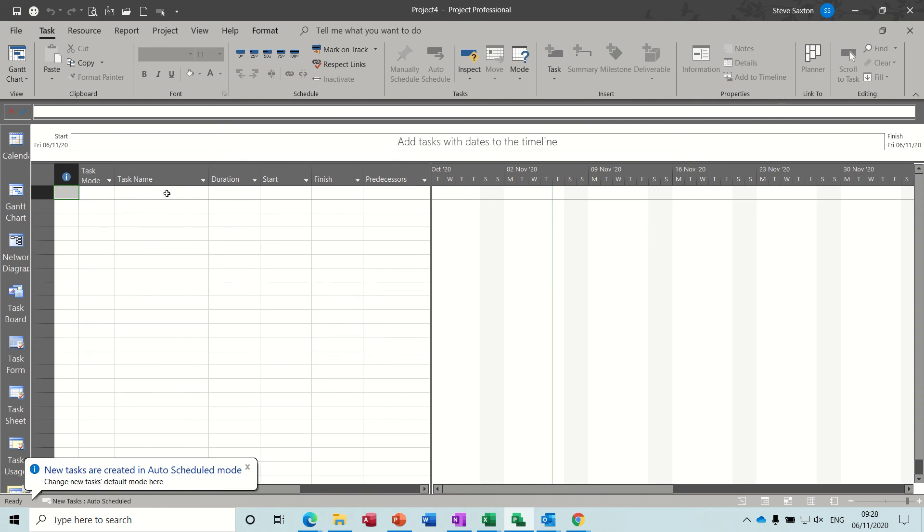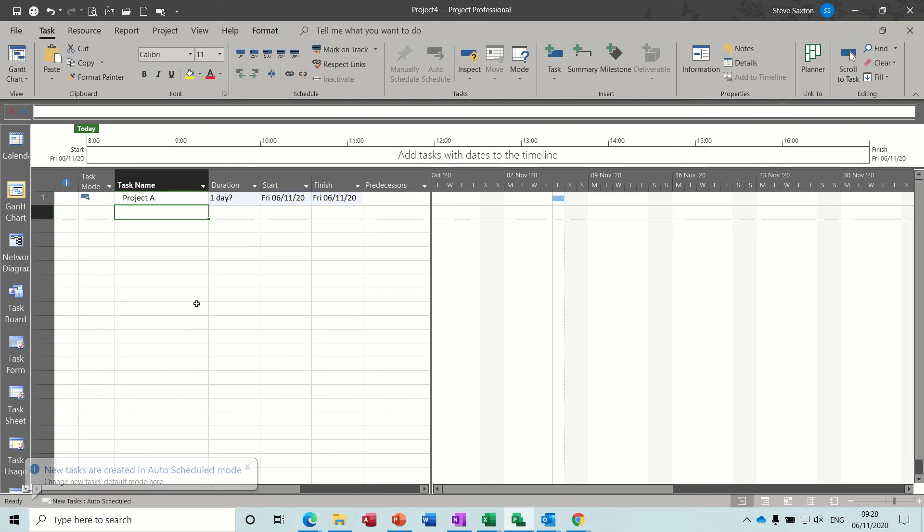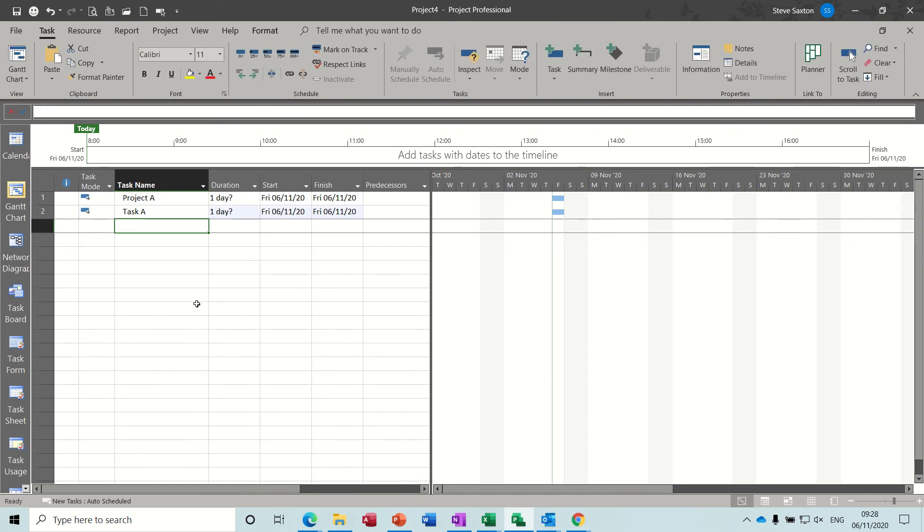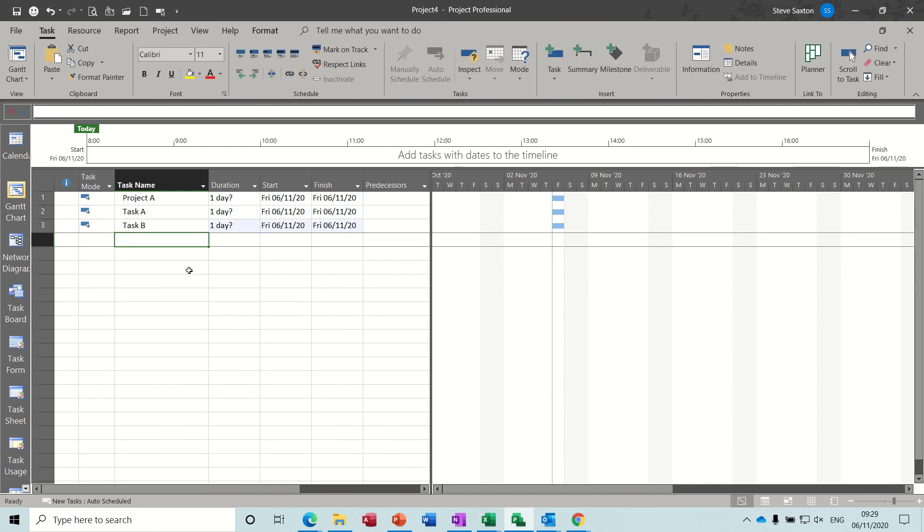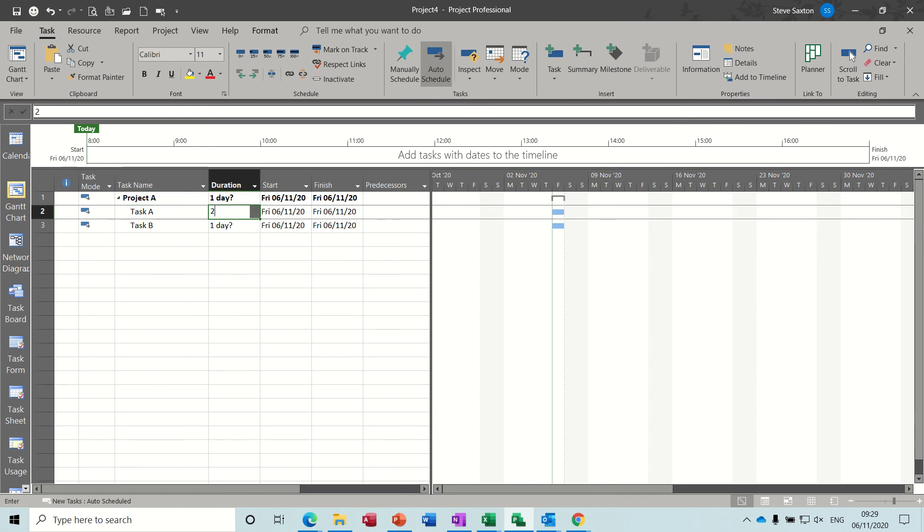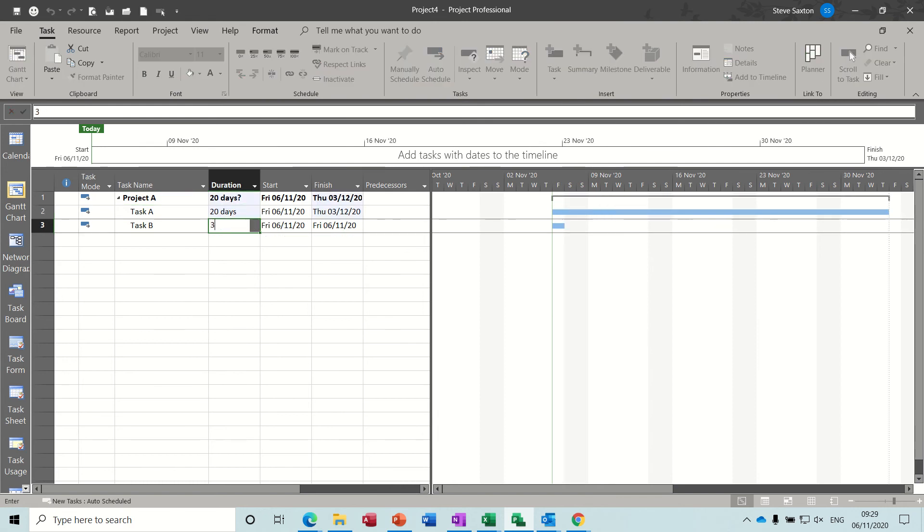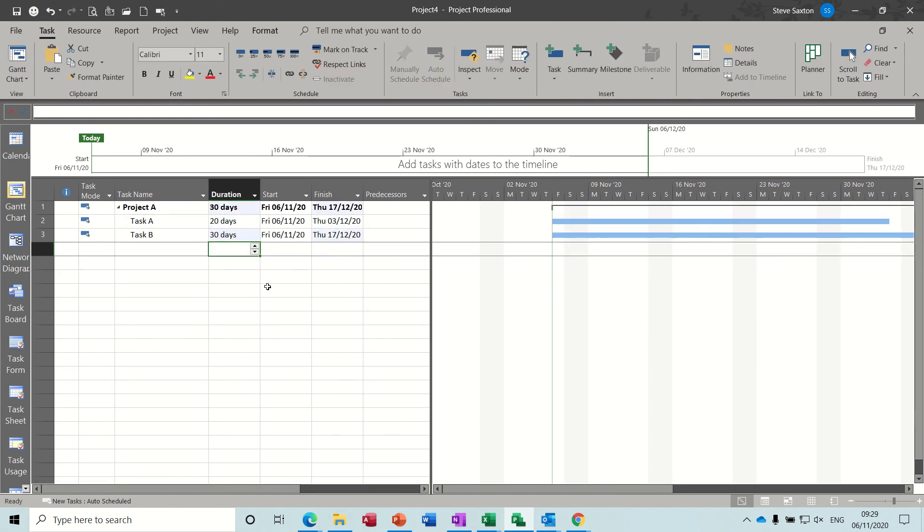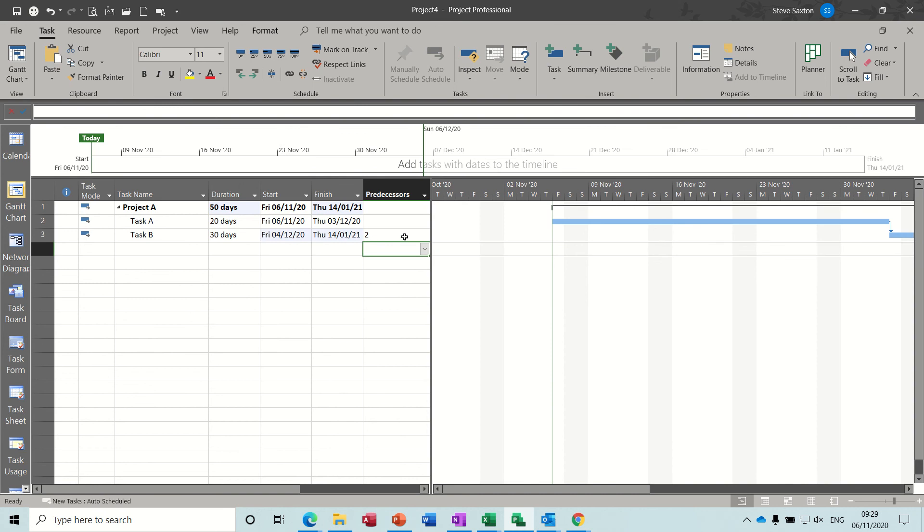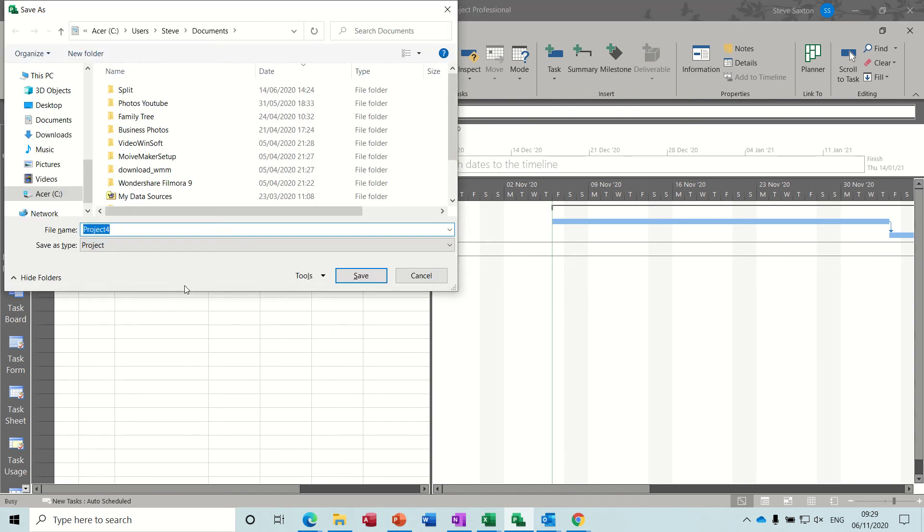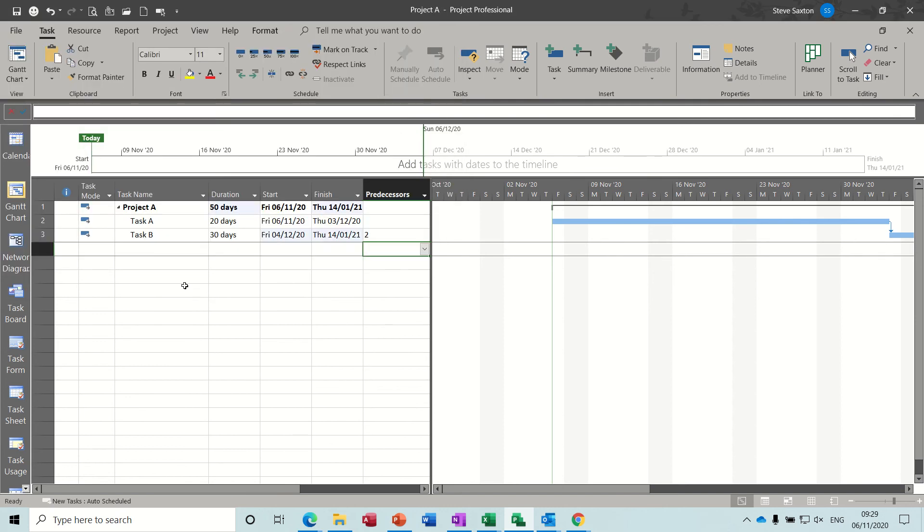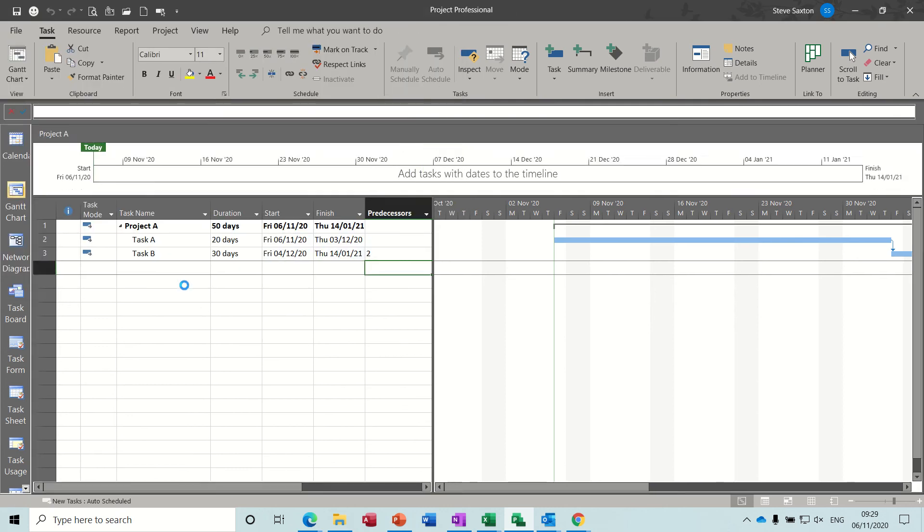What I'm going to do is create two projects. Project A with two tasks in each. Task A and Task B. And then I'm going to indent those two tasks and give myself a duration like so. Just link them on number two. So that's a 50-day project. And I'll save this as project A. So I know what it is. Project A. Where's that going? Documents. I'll get myself a new one.